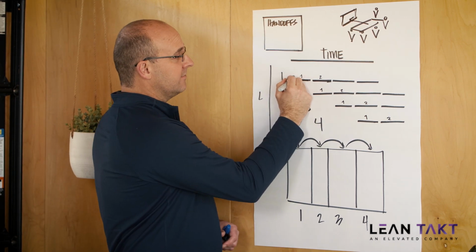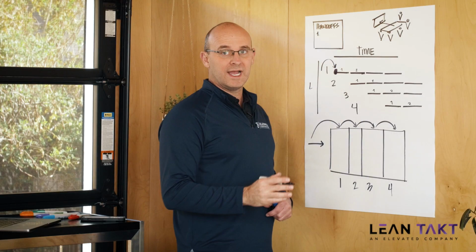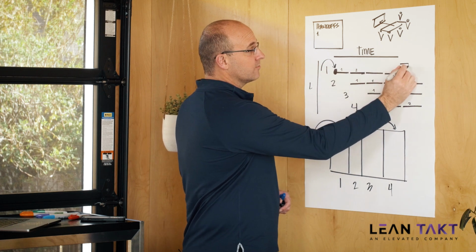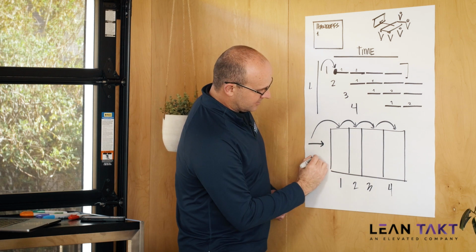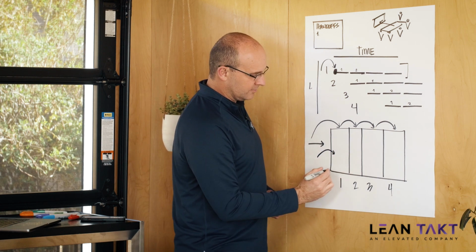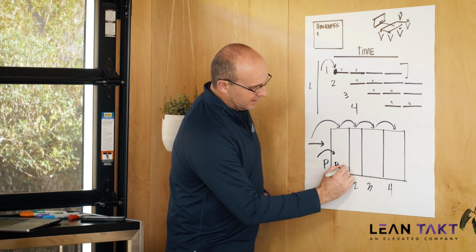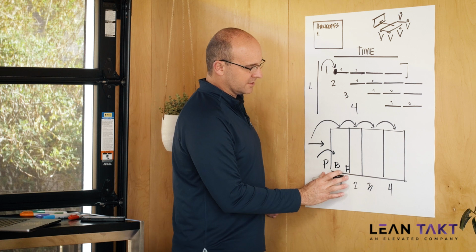So at the beginning of this wagon right here, you have what's called your first wagon walk. And this is always going to happen in this range here. What this means is the trade partner is going to hit into this zone, and hopefully they're planning the work, building it, and going to finish and reflect as they go, working in one process flow.